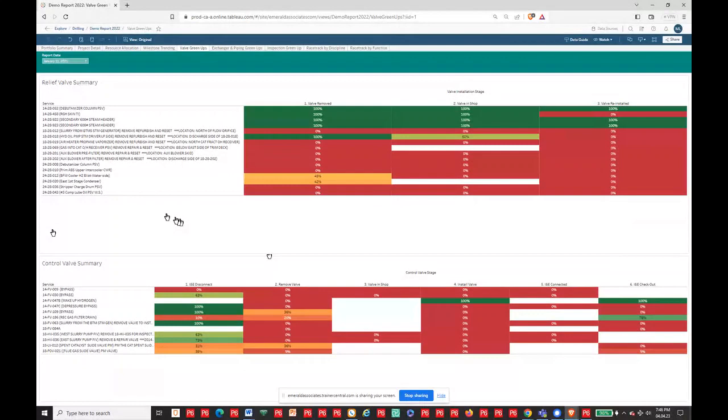Have some updates been missed, or did something get a status that actually isn't done, like something that's questionable? So if I go down to control valve here, here's one example. I've got install valve is 100%, and the elements in front of it have not been statused. Now, it may be a case where there's a reason that they were removed from scope or something, and somebody just didn't edit that. But you can tell at a glance very easily if something's out of sync, is what I usually term it